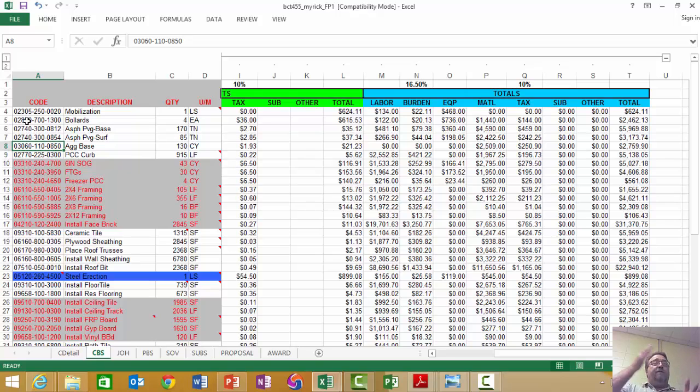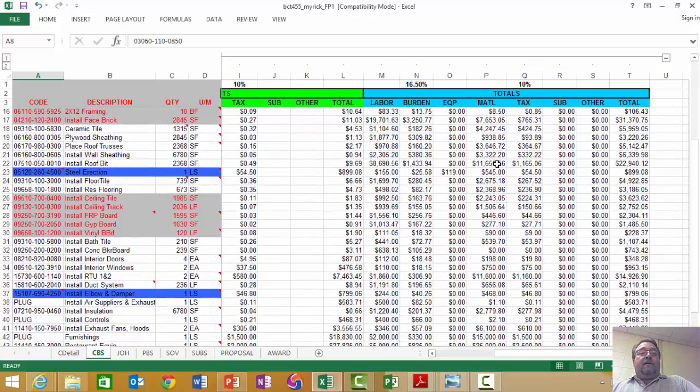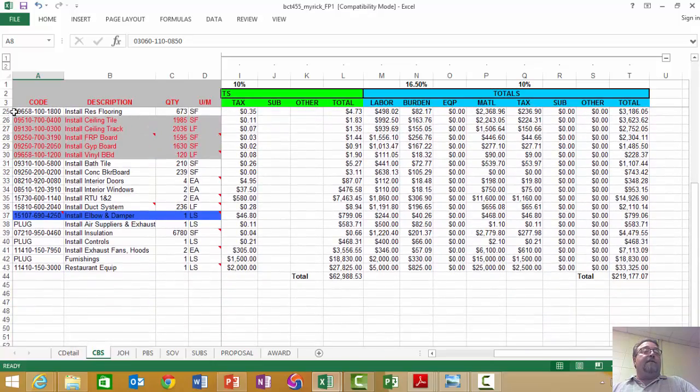And that gives you a lot more filtering capabilities, if you can imagine that. And a lot of the students in the class would do that. They would have 3 columns for a code of this type, and you could filter and do compound filtering and that kind of thing.